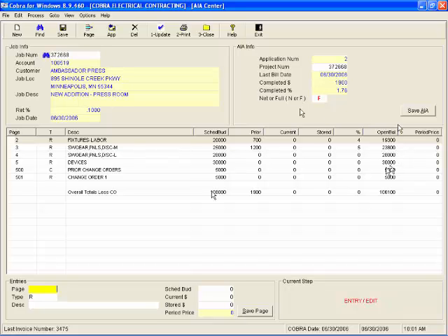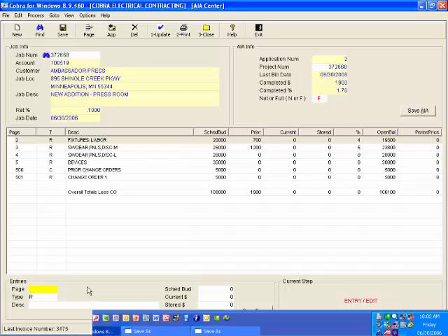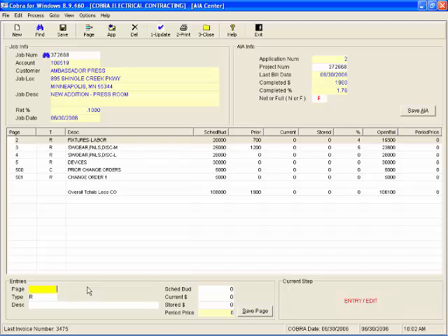The other thing that COBRA did is it created an invoice for the application that you just completed. Now this invoice, as you can see at the lower left, is not on your accounts receivable. Alright, it created it, but it's not going to assume that you automatically want it on your accounts receivable. Maybe you made a mistake on the billing, or maybe you're catching up applications. Alright, so that's why we don't automatically post the invoice that each application makes.